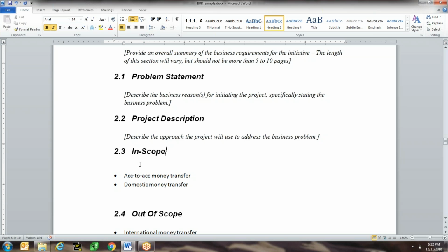It's very complex. We cannot build it. We cannot build this functionality because we have to build everything by end of this year, and we are already committed to build the entire system. But international money transfer is something we cannot do. That's a very complex functionality and it's very regulated. Government doesn't allow transferring more than $3,000 at a time when wiring internationally. So lots of regulations. We cannot do it.